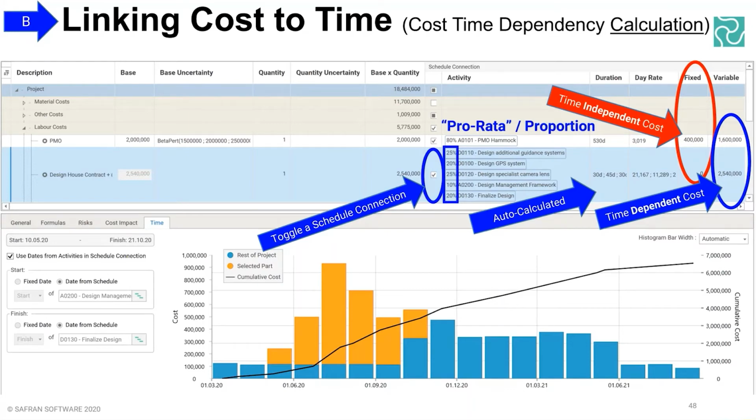Then I began proportioning and prorating different things with no particular knowledge necessarily, but I was able to take a very good guess with my understanding of the project, and then start running Monte Carlo with a fully integrated model, and generate insights of where cost is really coming from on this project when schedule drives additional cost and such like.